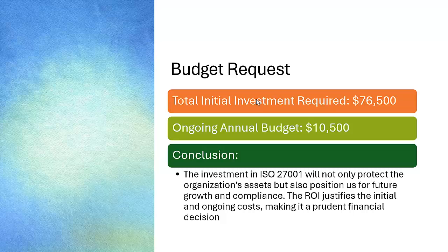So it's up to you. If management doesn't have time, then you will submit the project initiation document in which the same content is there. But if the company really wants to understand initially why we are going for 27001, then you can cut short this slide deck and present it accordingly. Is it clear? Once you present this, they like the idea, then you will submit the PID. And once they approve the PID, then the first document we create is the ISMS scope context. In my next video, we're going to discuss how to create a scope context, which is required for the implementation.